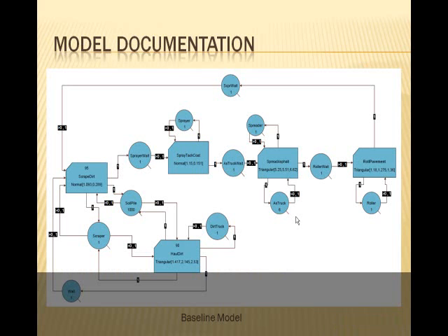Here we have the baseline model that we created using the Easy Strobe software. As you can see, the 5 sub-activities were placed into the model, and each activity shows a queue before it that shows how the activity must wait before it can start. Each resource is also initiated in a queue, and initial baseline values were assigned to each of them. The scraping and spraying of tack coat activities displayed a normal distribution, as shown here. The other activities displayed a triangular distribution.